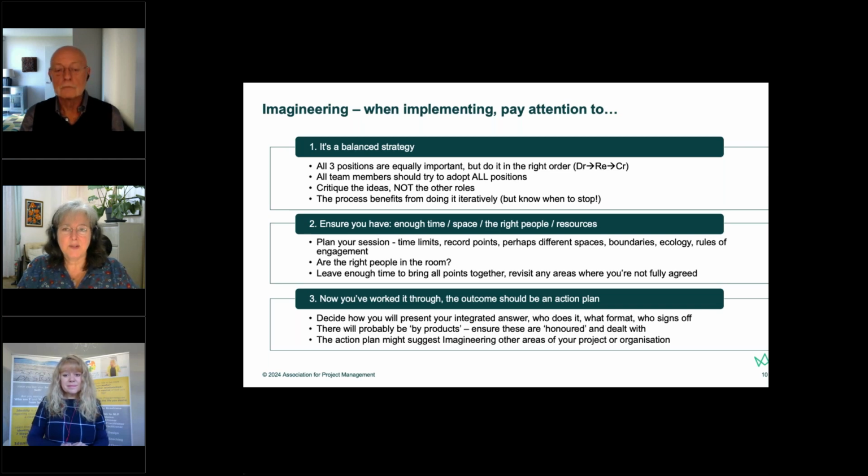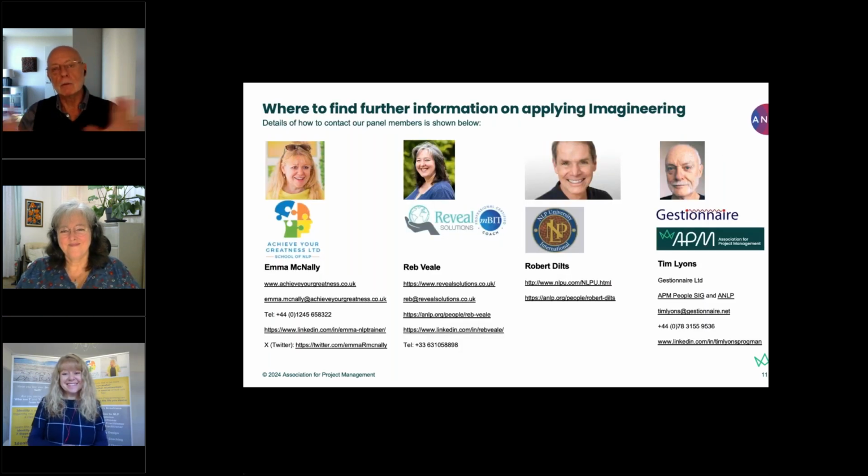And leave enough time to bring all the points together. It's not just about dividing your time by three. Leave time in between to choose what you are taking forward and where you are now at the end of that. And of course, decide how you're going to take your answer and present it. Who's going to do that? If it needs signing off, who does that? There might be some byproducts. Make sure you honour those and deal with them. And the action plan might suggest doing some Imagineering in another part of the organisation. You never know.